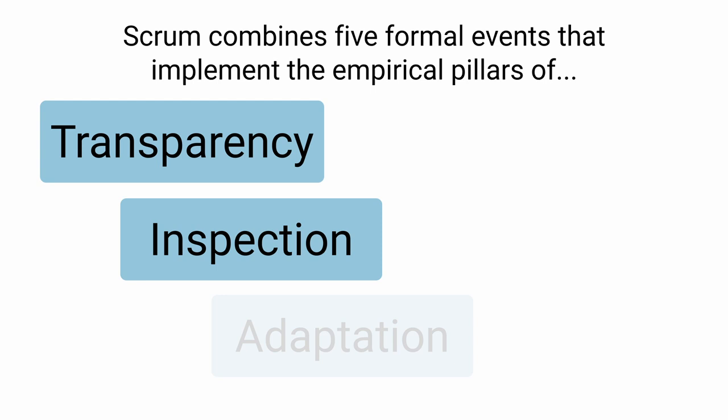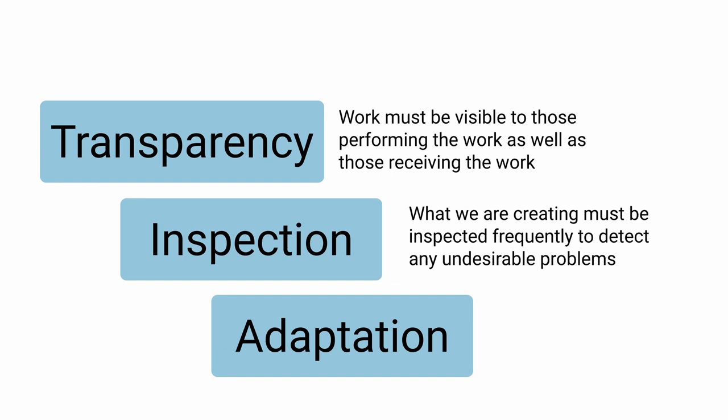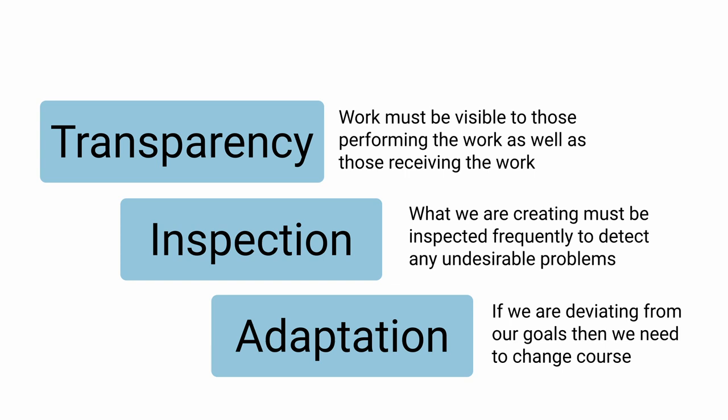Transparency: work must be visible to those performing the work as well as those receiving the work. Transparency enables inspection — inspection without transparency is misleading and wasteful. Inspection: what we are creating in the team and the progress towards agreed goals must be inspected frequently to detect any undesirable problems. Inspection enables adaptation. Inspection without adaptation is considered pointless, as Scrum events are designed to provoke change. Adaptation: if we are deviating from our goals then we need to change course. The sooner an adaptation is made the better, but this is difficult without self-management or empowerment.